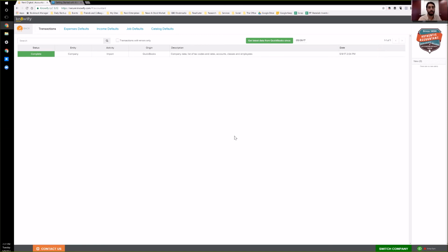And the true preferred workflow for Notify and QuickBooks is that everything goes into Notify. And you'll see a little bit more about that while we go through. It really just gives you more detailed job costing, where you're not just seeing total job cost. You're seeing my electrical installation job cost, my framing job cost, my drywall job cost. That's how you get the detail in Notify. I don't even introduce the other side because it's more simplistic. Live in Notify. I live on the other side to support you.